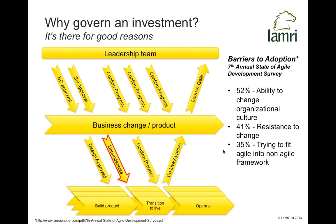As our business solution involves touching one or more underlying products, each running to its own agile heartbeat, we've got to think about dependencies between them. We need to consider what combination of features needs to be delivered at a particular point to enable an increment of service to be demonstrated to project sponsors or released. Statistics from Version One's annual state of agile development survey show over half of respondents cite changing organizational culture as one of the biggest challenges — a very waterfall-focused governance being a big aspect of that culture.